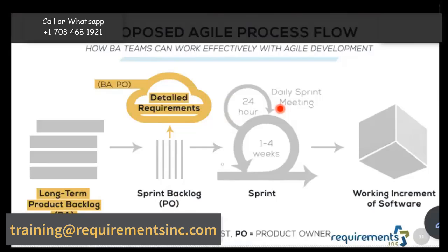Now let's talk about, okay, you turned your wheels properly and everything is going as expected. Now you're about to end the sprint. You have a couple of days left. At that juncture, you do two things. One, you present it to your customers. You demo it to your customers and get their feedback on what they think. They might be like, lovely. They might be like, it's crap. Worst case, right? Even if they say that this does not meet their needs, you only wasted 2 weeks of time, not 52 weeks.